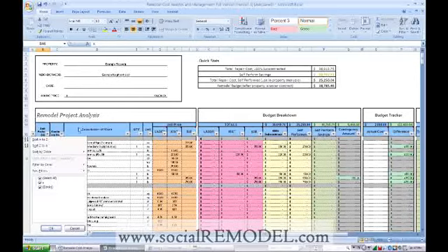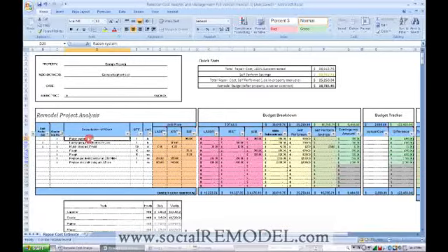Contingency is exactly the same. You can sort it based on contingency items. As you can see, what we have in contingency right now is the radon system, landscaping, mulch, rough electrical, rough plumbing, and it looks like a gas-fired unit and an air conditioning unit. So we've got about $6,464 in contingency. This way you can go through each line item and delete each item if you feel you may not need those items, and that way you can crack down on your budget and get it within a reasonable cost so you can make more money on your job or save money on your job.